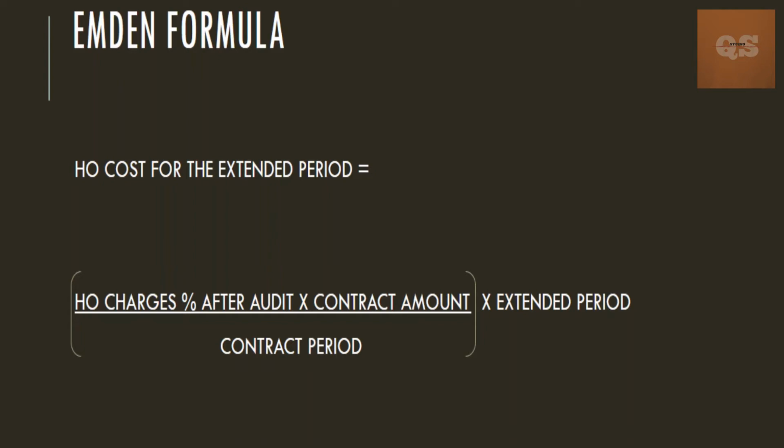So it is easy to find out the amount being spent on the head office charges, or the expenses incurred for this project from the head office. An audit will be done. The client might check all the exact amounts, the invoices, your bills and all your expenses, copies of all your invoices, and the proofs and backups of all the expenses that have been incurred in the head office for this specific project.